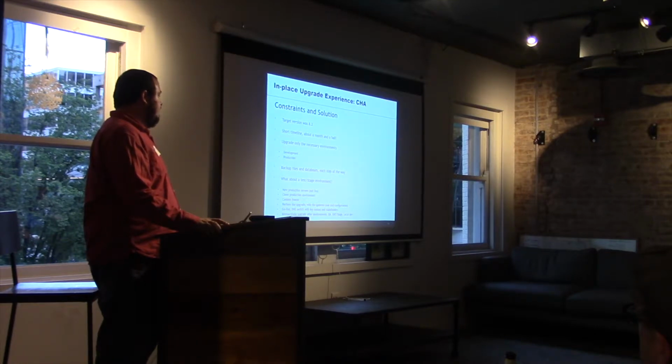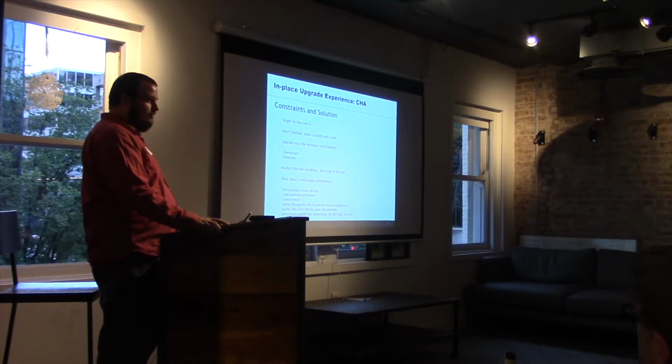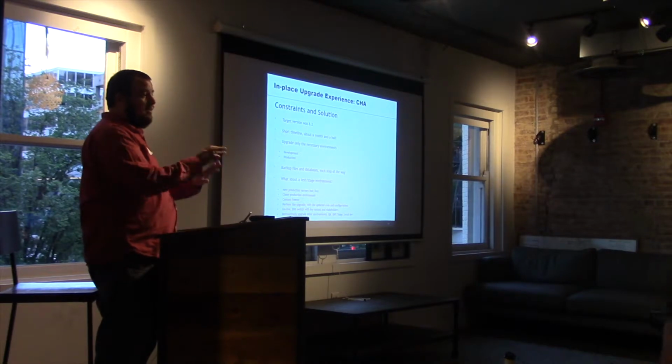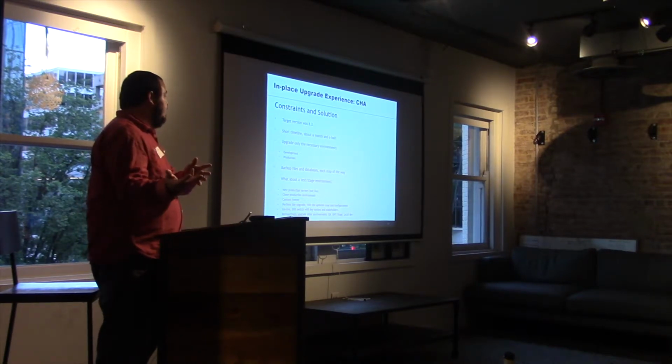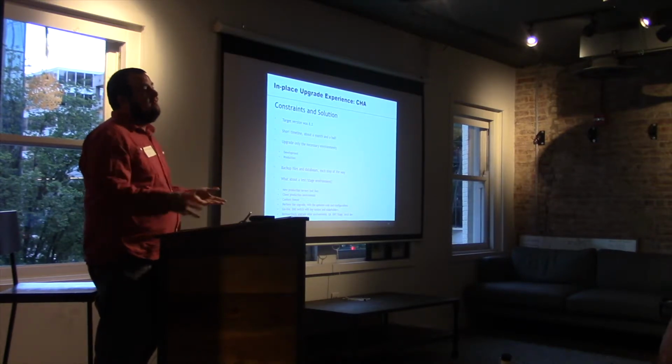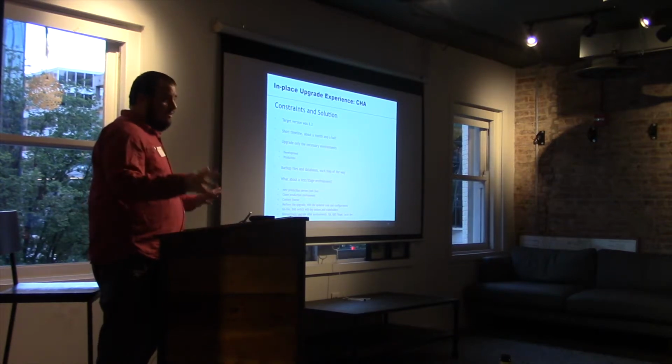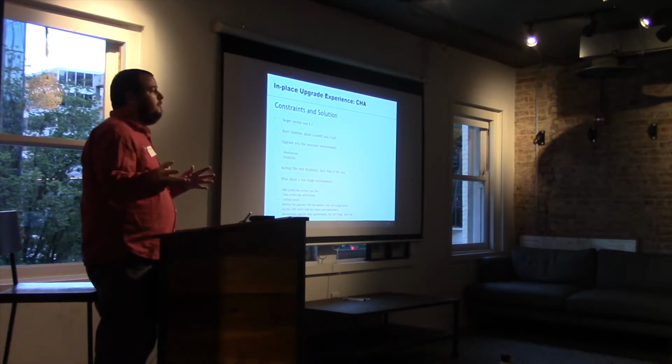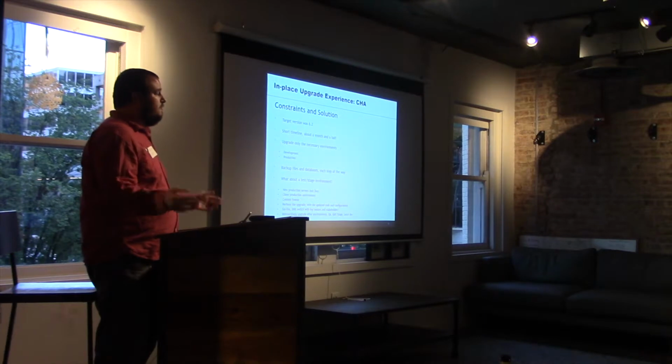The way that we did the upgrade, we essentially just cloned the production servers. So we had a complete clone of the production environment just on different IPs and different domains. So it wasn't live, and anything we pushed there was safe, knowing that no user was going to see it.